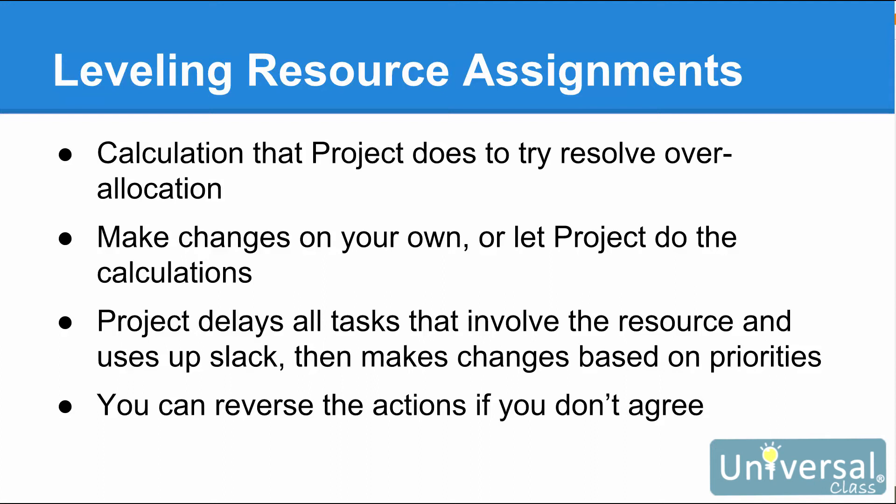Resource leveling is actually a calculation that Project does to try and help you resolve over-allocation of your resources. When you level a resource, you can make changes on your own or let Project do all the calculations for you. If a resource is over-allocated, Project delays all tasks that involve over-allocated resources and uses up any available slack. When there is no more slack available, Project then makes changes based on priorities you've entered for tasks and dependencies, as well as task constraints such as Finish No Later Than. If you do not agree with the changes Project would make, you can reverse the actions.